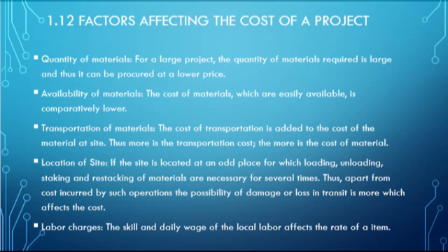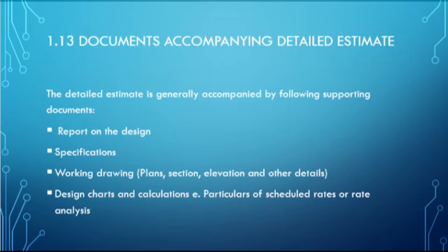Next are the documents which are required for the detailed estimate. Number one, report on the design. Number two, specifications, working drawing, that is plan, section, elevation, and other detail, design chart and calculation, that is particulars of schedule of rate and rate analysis. So these are the documents which are required for this.